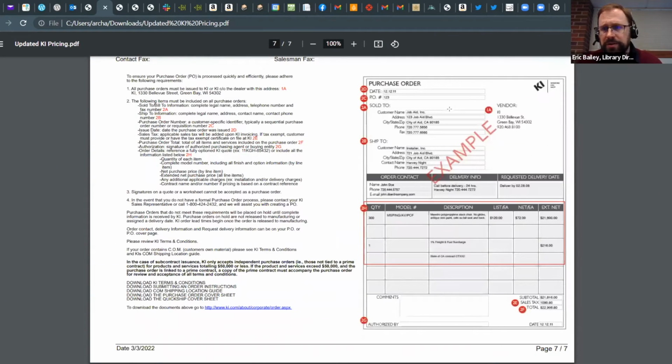Okay, so is there anything else here in terms of materials, expenses that we can approve to kind of frame where we're at? Anything over $5,000 is over my signing limit and really needs board approval. And at the meeting earlier this week, the board authorized the Building and Grounds Committee to approve up to $78,000 worth of work. So if we can get it in front of the Building and Grounds Committee today, as something that would fit in as an expense over $5,000, we should probably try and do that if you've got anything else handy. So the only other expense is on the budget sheet that's dated 3/11. Let me bring that up. I'm assuming your assumption is we want to let all the hard cost stuff out so we can get rolling. Yep, spot on. That's what we're aiming for.